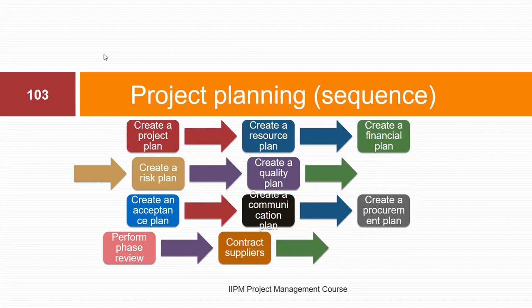What is the difference between project plan and project management plan? A project plan is a detailed description of all the tasks and activities involved in a project. So it shows you the complete work breakdown structure. It breaks down the project into phases and from phases to tasks, and then helps you to see the relationship that exists within those tasks and phases. That's a project plan. So in essence, a project plan is a tactical plan.